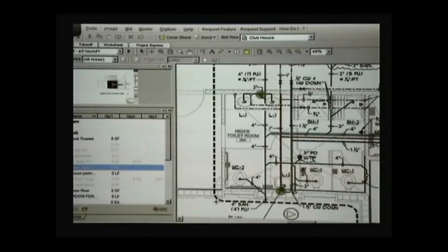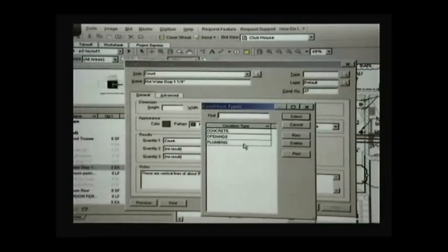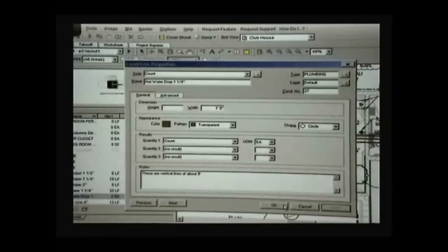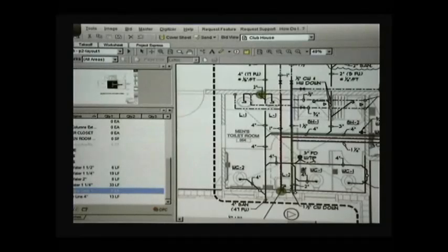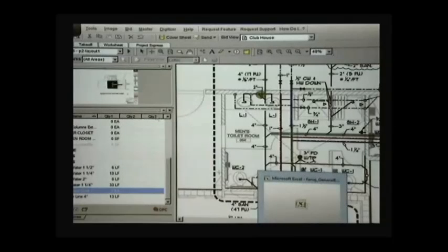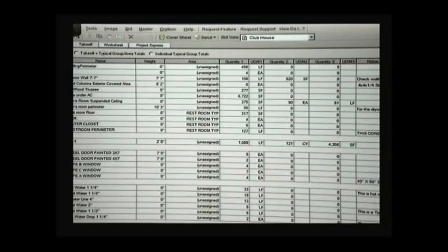So they will also be included in my plumbing type, right? And then when I do my estimate, when I take these to Excel, I am going to use those drops in my calculations to estimate the length of piping.